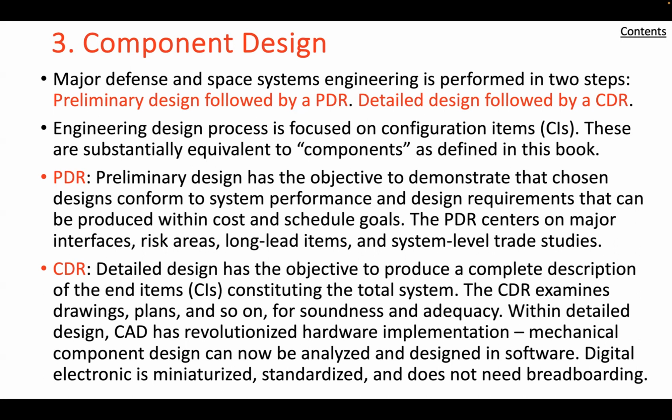The issues addressed in the CDR are partly predicated on those identified as critical in the PDR and therefore are scheduled for further review in light of the additional analysis, simulations, breadboard or brassboard, or prototype tests conducted after the PDR.